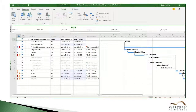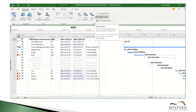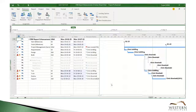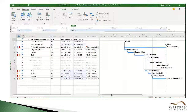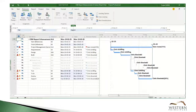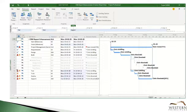We'll double-check that hypothesis by checking this last named resource, and in fact that resource's schedule is only over-allocated until July. So we have clearly found the bottleneck in the schedule, and in this case we can look at perhaps replacing that resource with a resource with a similar skill set and more availability in their schedule. We can take a look at how to do that in the next video.